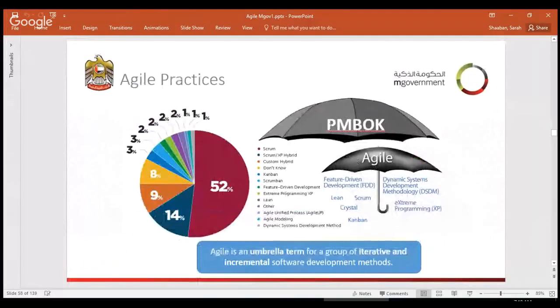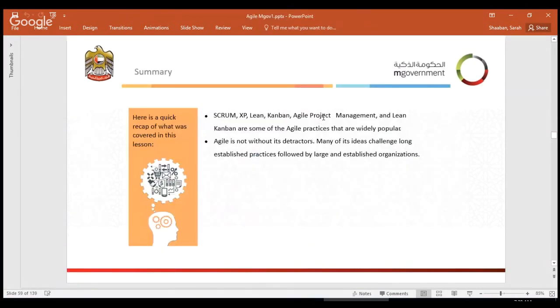Yeah. Agile practices, we said that agile is based on the PMI book, based on the same body of knowledge you got from the PMI book. The only difference is that the PMI book works on planning, execution, monitoring and control in a phased approach, and you do it for the whole project at once. However, the Scrum approach is used for incremental software development. You have a list of requirements. You choose from that list of requirements. You do the planning, execution, and monitoring and control for those requirements, and then you repeat the iteration.